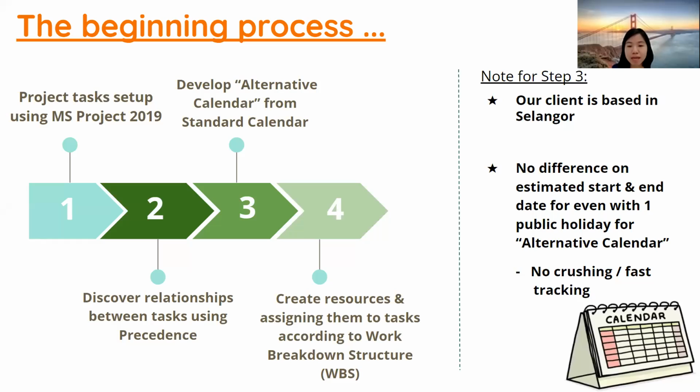The project began by using MS Project 2019 software to set up all the tasks and to discover the relationship between tasks by inserting predecessors. As our client is based in Selangor, we follow their local calendar, in which an alternative calendar is created. Even though there is an additional public holiday by using the Selangor calendar, the estimated start and end time for the project, however, still remain the same.